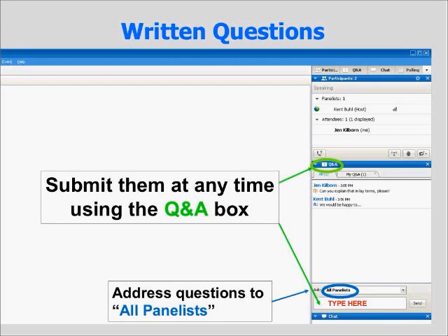And you will need to identify all the funding sources on your public notification processes. For example, on the notice of intent to request release of funds. In the FONSI itself, you will need to identify that so that the public is aware that there are multiple funding sources also. But there can be one review that covers multiple HUD funding sources, provided it is exactly the same project.